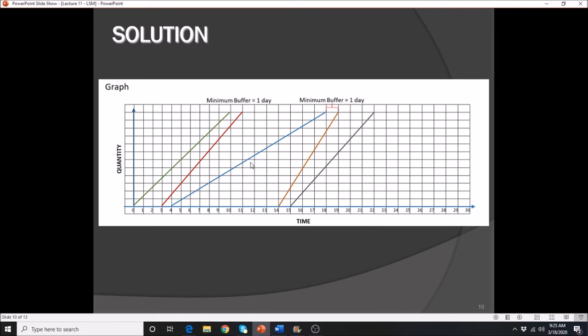Now, if you are just going to move your activity B and finish to wherever you want, you may end up with longer days, and we don't want that as well. The longer the project, the higher the amount of your indirect costs. Okay, and another thing, by contract, there are certain durations within which you need to finish the project, so you need to make sure that you create a schedule that will provide you the optimum schedule date, and that's the reason why we have this.